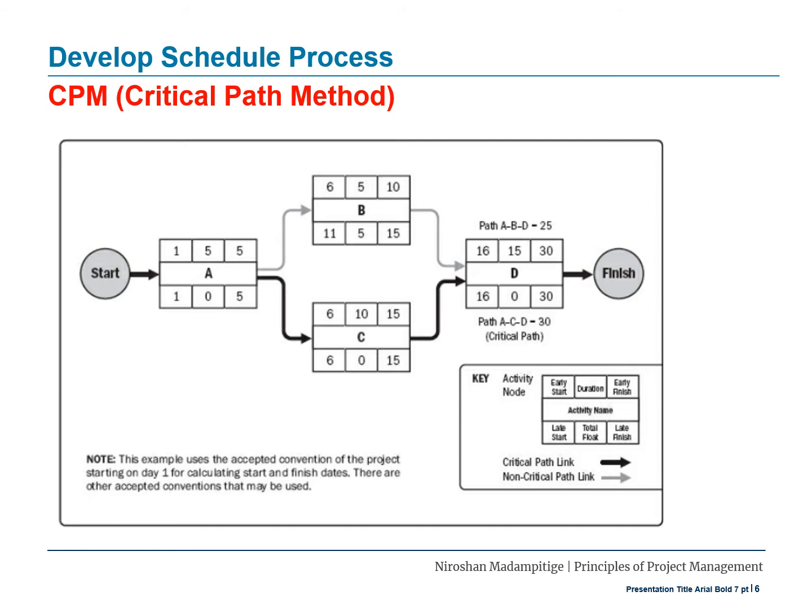The longest path has the least total float, that is usually 0. The resulting early and late start and finish dates are not necessarily the project schedule. Rather, they indicate the time periods within which the activity could be executed using the parameters entered in the schedule model for activity durations, logical relationships, leads, lags, and other known constraints.